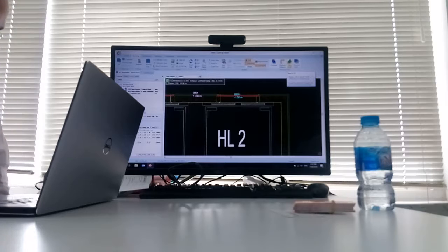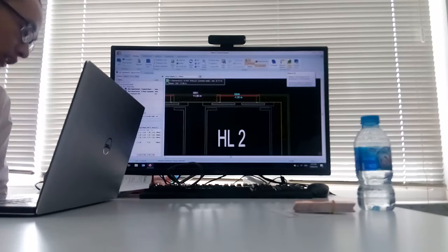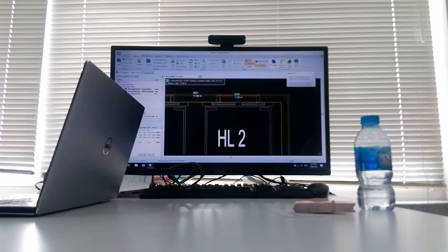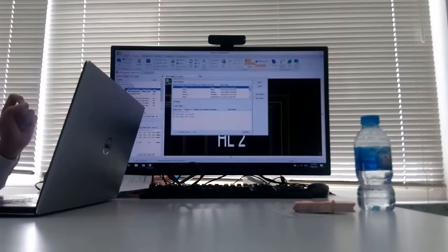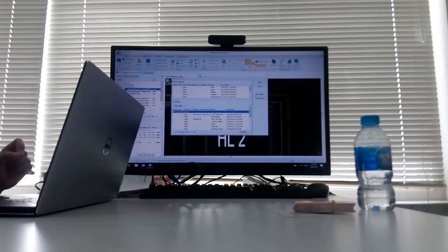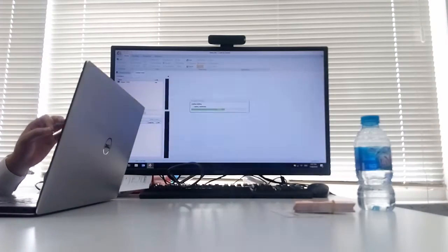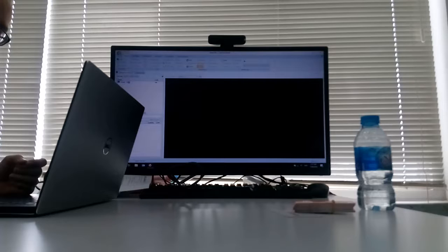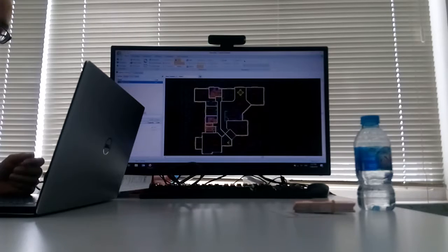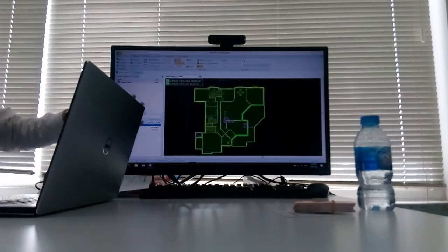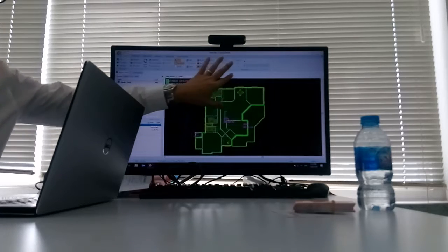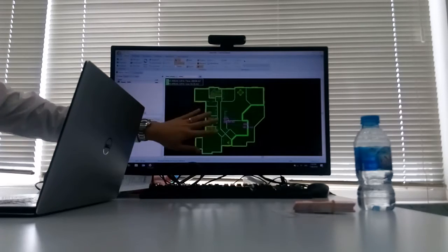Okay, so that's the variation on the plan drawing. If you want to create a variation on the elevation, you must have two elevation drawings to import. I will show you the revision tabs first, because I'm not sure what you have gone through for revisioning. The way we do revision, you must first do the first round of measurement. This is the sample, I just show you the revisioning steps we need to go through. Based on the drawing, you do the initial measurement, whether it's a layout or elevation.